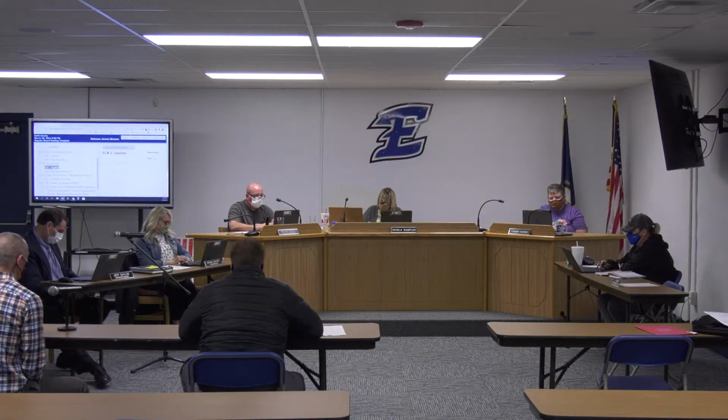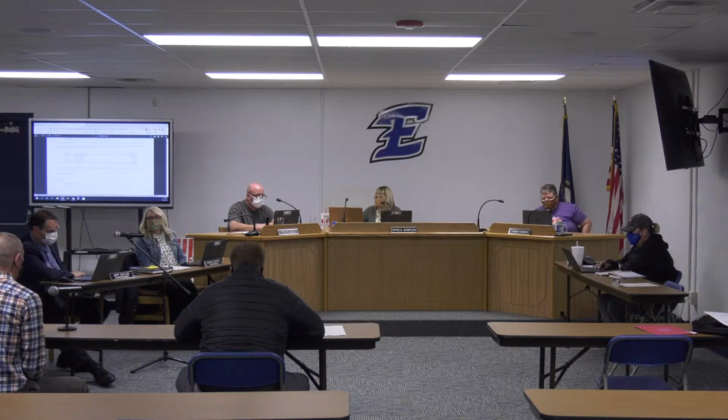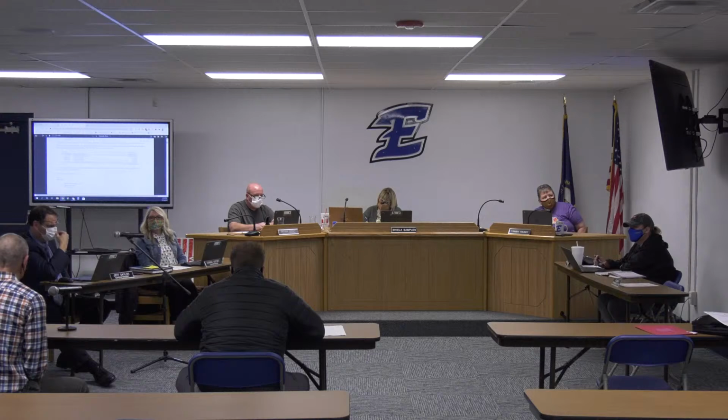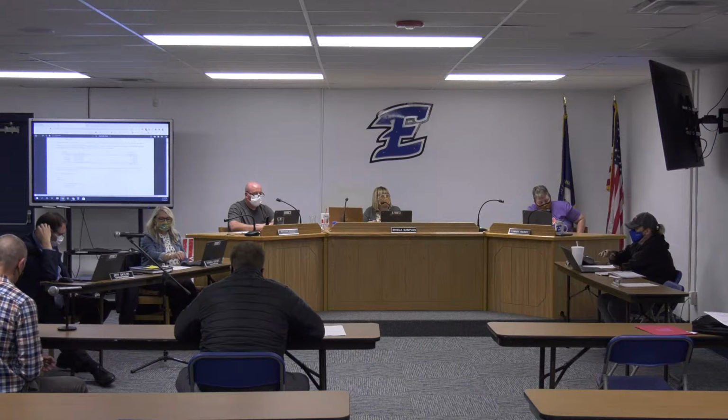So we have provided a punch item list for him to tackle, and a lot of those issues are going to need to be tackled when the weather is a little bit drier than it has been this month. So the pay app that you see before you does indicate that there's still a little bit of money left in that project, but they're just asking for money that we do feel like they have installed and completed to date. So I'll be happy to answer any questions that you have about that particular project.